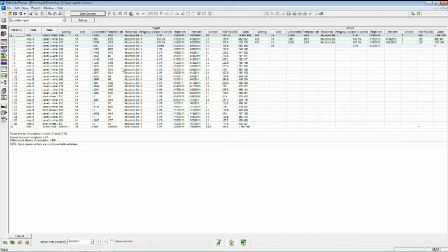And what you can see here is on the left-hand side of this matrix, we have the target production, which is number of pieces of steel by location, expected production rate. In this case, we're in the 40s and up to 60. And then over on the right-hand side, we have our actuals. So if we take this first line item up here, the production rate expected was 43.5 picks per day.